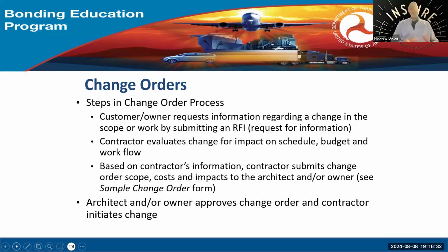So when you do your change order, RFI 1, you submit the next document as a change request document, right? So that's a different log, because some RFIs are just information, they're not money, right? But some RFIs will turn into money. Then you've got this thing called a request for change order form that goes through. So if you don't have those two documents, you can call them whatever you want. The first document says you've got a problem. The next document talks about how much that problem cost, right? And those things will roll up into a change order to some degree.